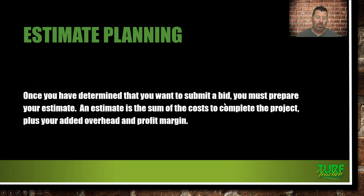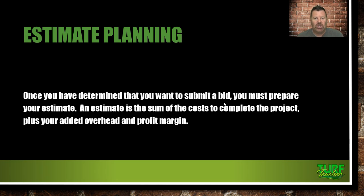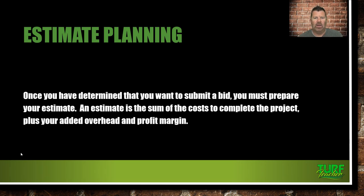Once you've determined you want to submit a bid, you must prepare your estimate. An estimate is the sum of the costs to complete the project plus your overhead and profit margin. Most of you already know your daily overhead — office staff, shop rent or mortgage, all considered overhead. You probably know your overhead per hour — what it costs you to be in business per hour before you do any work. I hear contractors saying they're working on 1% margin, and I ask: why would you even want to be in business?